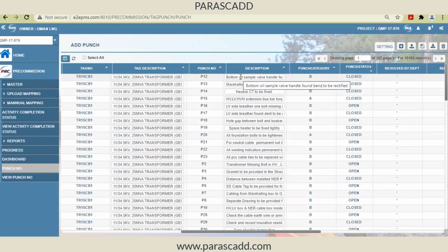The inspector is coming and checking all those points, physically seeing, and then giving some comment. Okay, note down out of this format, first format, point number 3. This is my comment, and you can take this in B category punch. So this is nothing but punch listing, and that punch listing will be entered into the system. You can enter it here by addition, or you can enter it in Excel, download the template. Maybe you have already entered it in Excel, copy paste it in this format, upload it, so that these punches are available here. So what is the punch number belonging to which tag number, and the tag number is already associated with the system, subsystem number, and system number also.